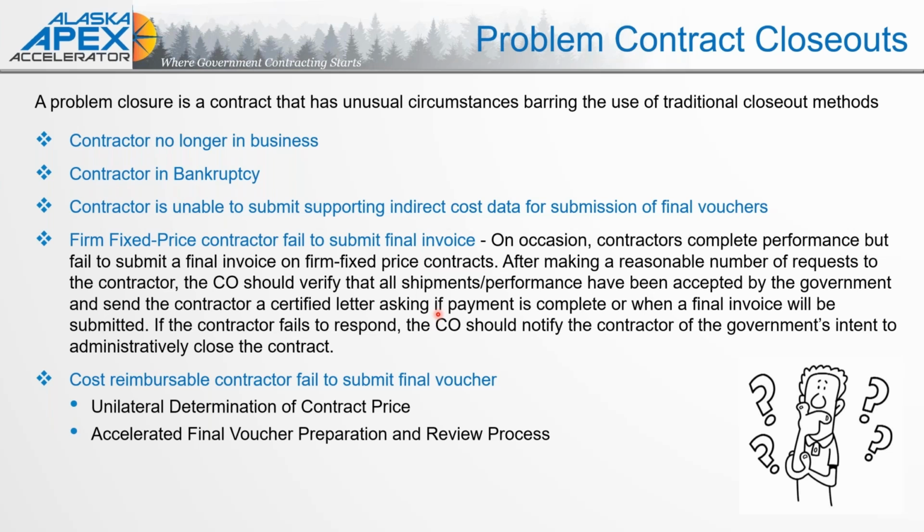One business I worked with, their computer had crashed and they lost all their documentation. They didn't have any paper files, and he couldn't prove any of that actually happened. He couldn't provide that supporting documentation. So these types of things create a problem when the agency is trying to close out the contract. So for you, think of it as a subcontractor.